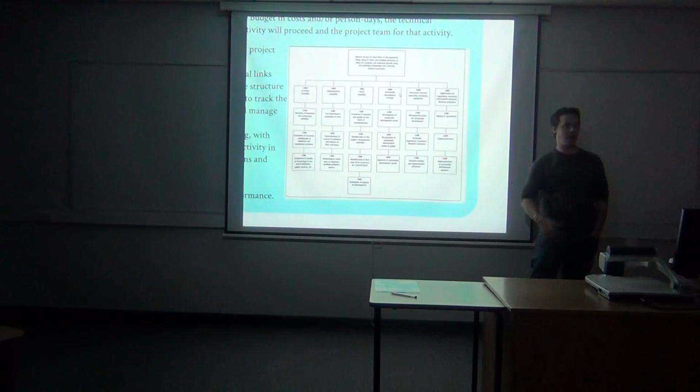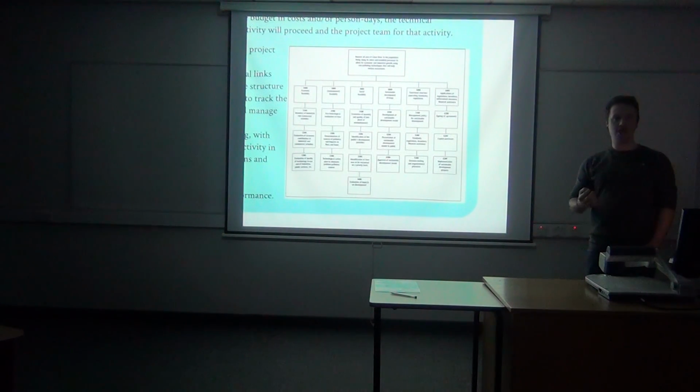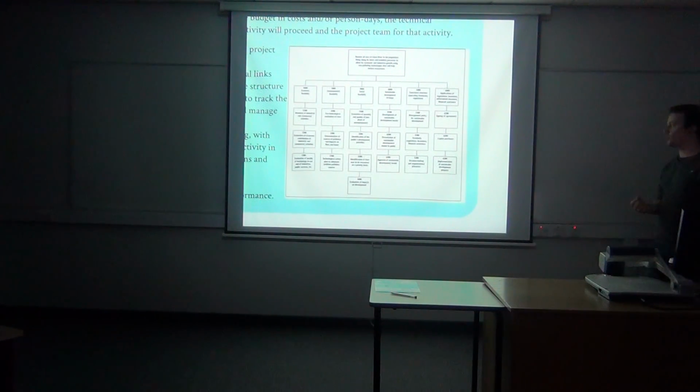So what I'm saying here is when you're planning sustainability into a project, you have to have it in your general workflow. You have to have it broken down into each element. You have to have responsibilities assigned. You have to have it joined up with the rest of the work plan. And it sounds like a no-brainer, but this, again, isn't common.